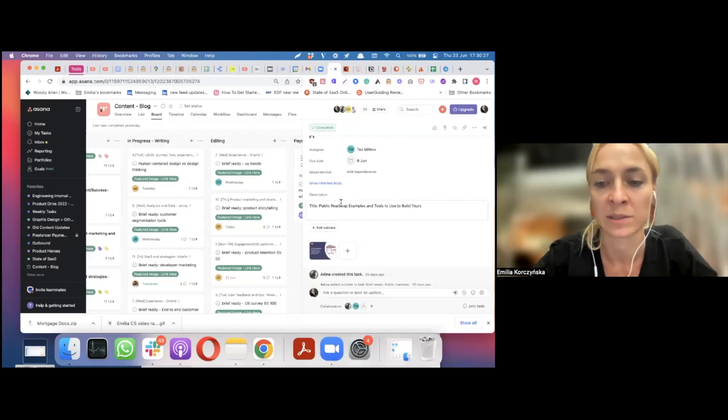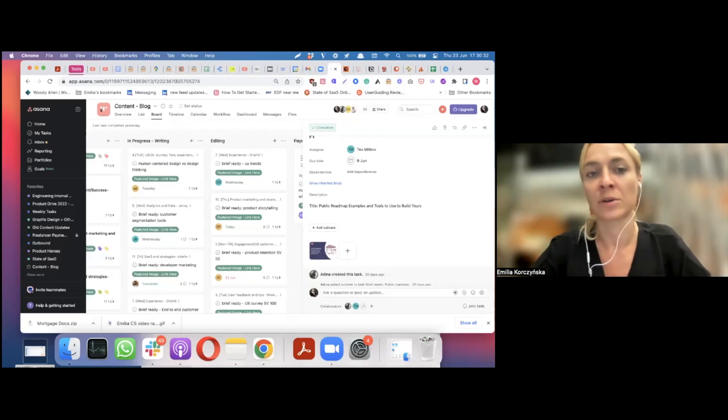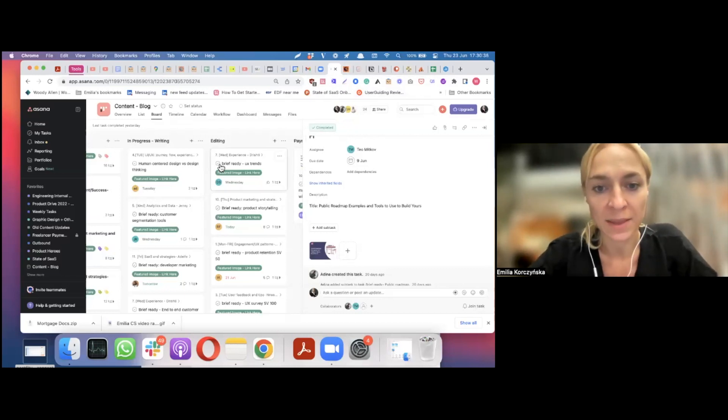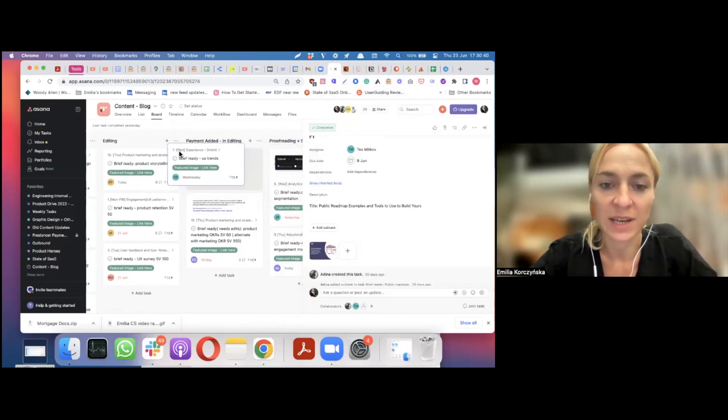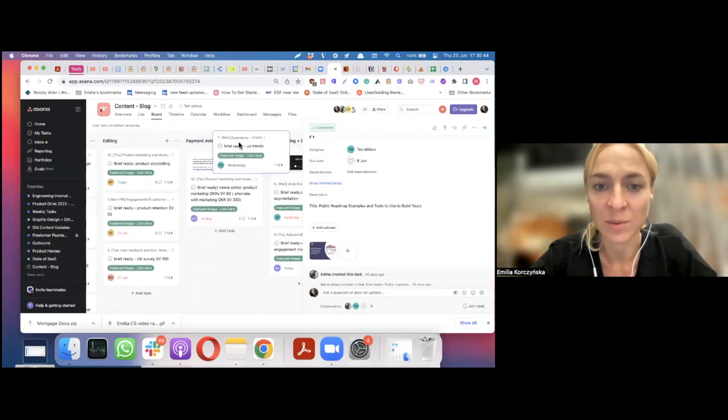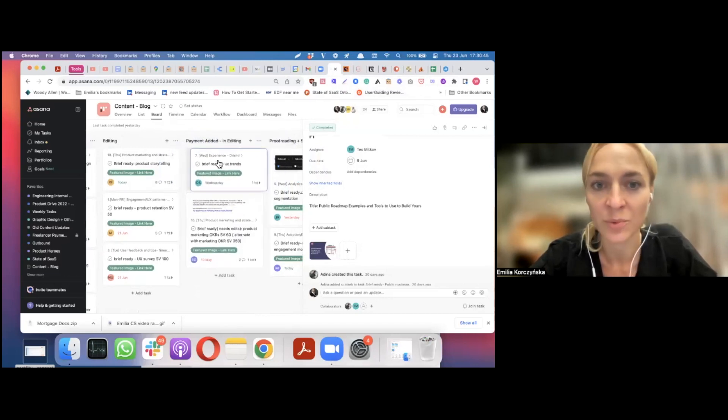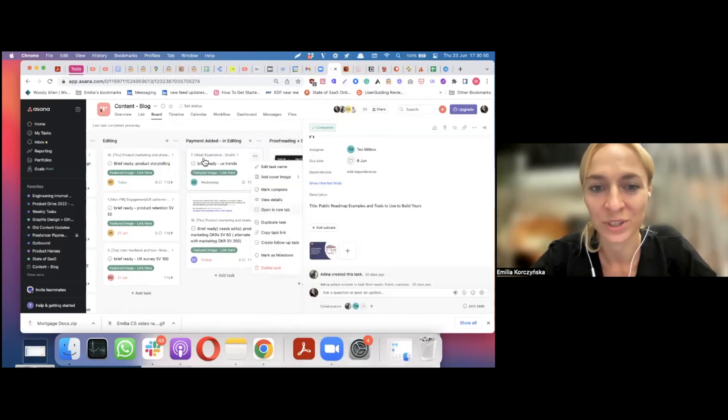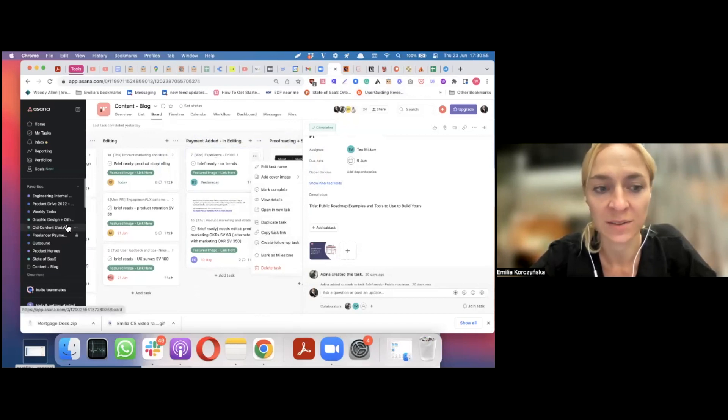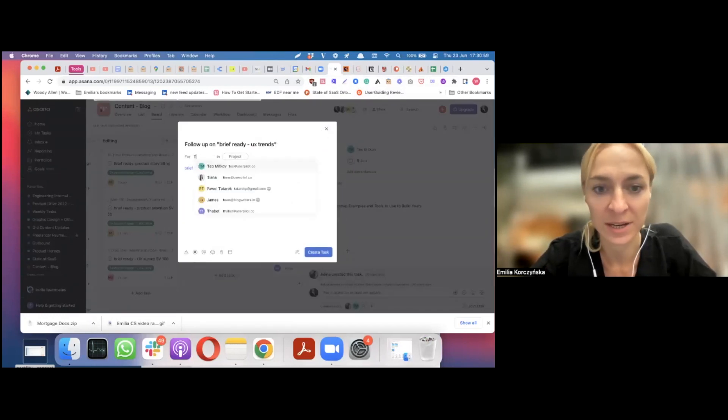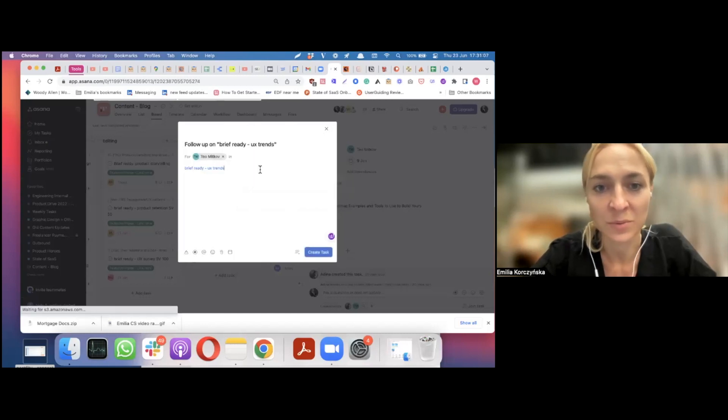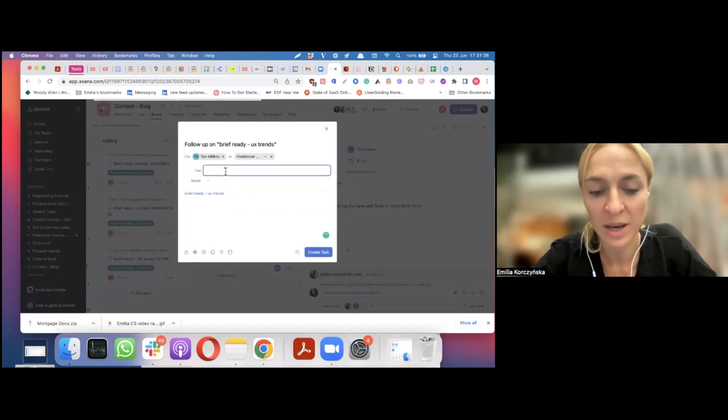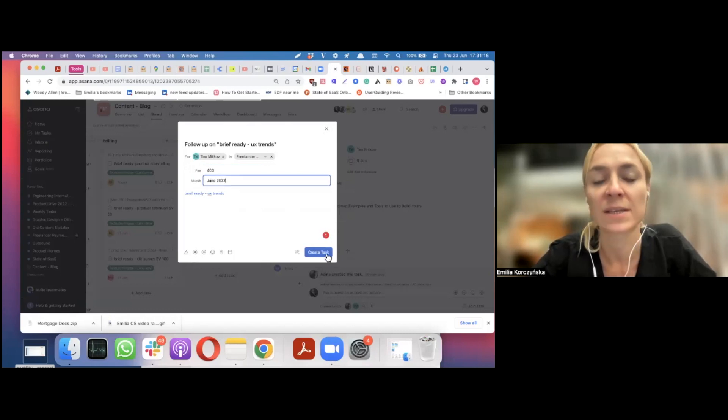And then, when the editor is done with editing the piece of content, first, they add a payment. So, sometimes, when they are not able to finish the editing by the end of the month, they add a payment for the writer before and just leave it in editing. So, essentially, we created another board on Asana. So, we would put the writer's name here. Let's say it was here. It wasn't here, but let's say it was. And we would put them in the freelancer's payments, add the fee and the month when it was done. So, when we create this task, it goes straight to accounting.